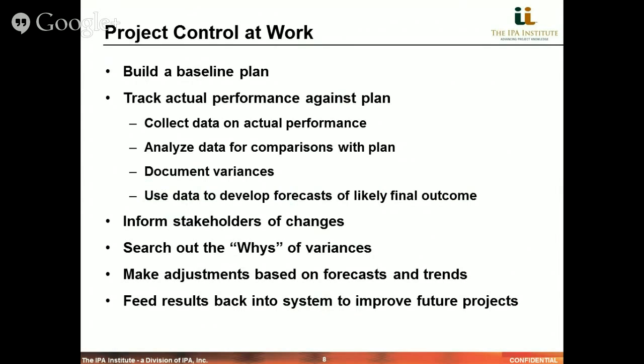Obviously, that requires an infrastructure for collecting data on the actual performance, a mechanism in your data collection to compare or analyze the data in comparison with the plan. So that would imply your data collection is designed in a way that matches your plan. And when you observe variances, document them and use the data to forecast the likely final outcome, whether the cost outcome or the schedule outcome.